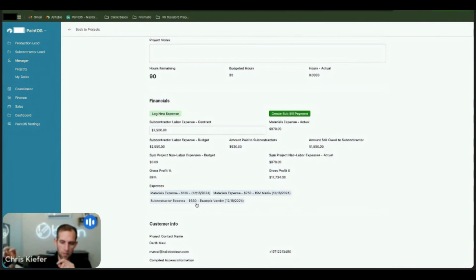That's what the name comes from, and saying, hey, I know you said you're going to pay me 2,000. Like I'd like 3,000, please. And then you have the ability to approve all of it, some of it, or none of it. And then that's what adds into the budget. So I would say, in my opinion, we should just add in that field of like, I'm going to approve some additional money to pay this person. And then that wouldn't affect your original contract amount. It would just affect your budget amount, which is what all of these ones are calculated from.